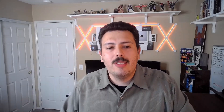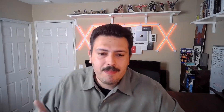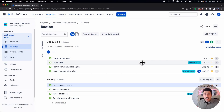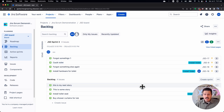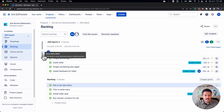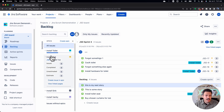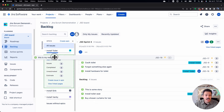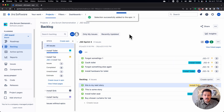When you utilize the priority, the releases, and the epics, you're essentially telling the team this is important. We can relate to the epics the easiest — as long as we have an epic creator, you can drag and drop a story into the respective epic and you'll see that the epic is linked.